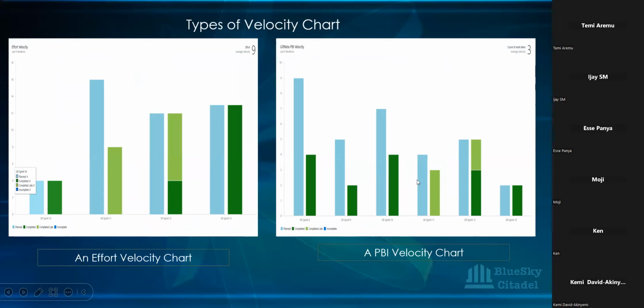We've not taken them on. And that's my job as a Scrum Master, because at the end of the sprint, I'm the one meant to move stories that are not completed, if that is the agreement, to the next sprint. So at no point in time, when there is a chart showing for another sprint, should any story be showing blue on your previous sprint.